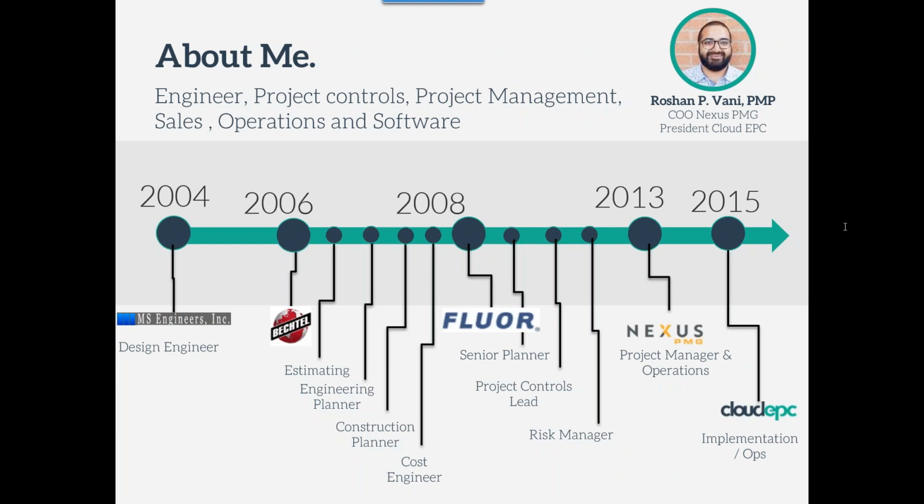And in that whole process, when we were building Nexus PMG and growing it, we quickly realized we needed a way to do rules of credit physical progress tracking that was dynamic and not purely a linear-based percent complete calculation. It was a weighted equivalent milestone-based approach using different units of production, which is the core of industrial progress tracking, with a main task and subtasks.